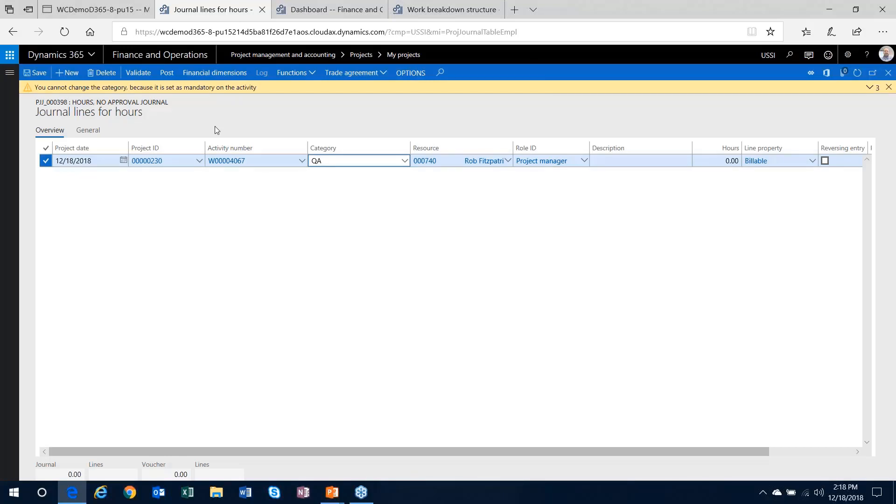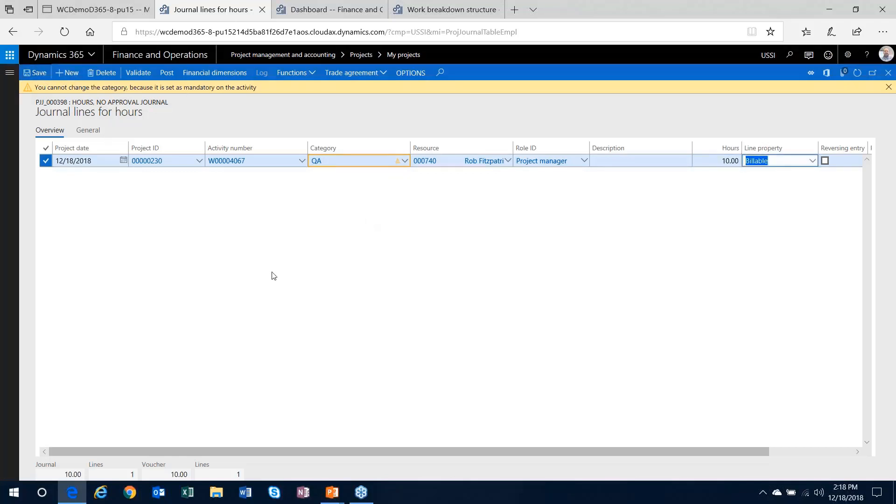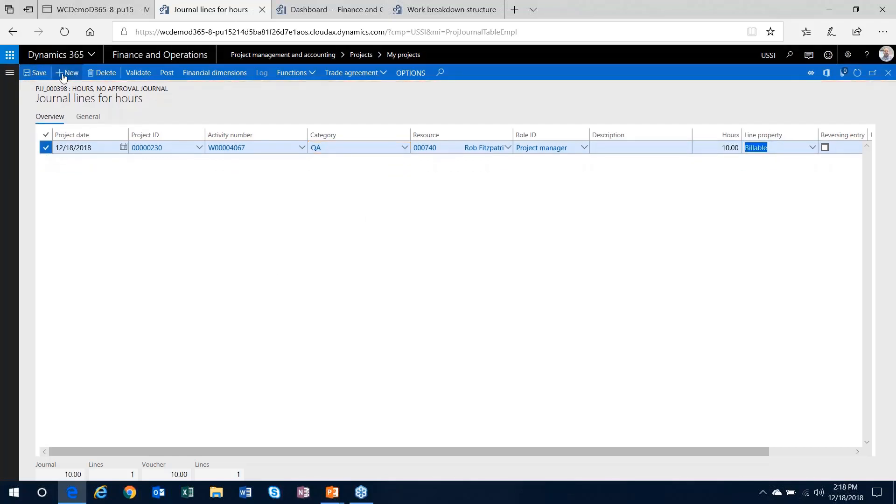So all that validation, all the settings and the checkboxes that we've checked, all will affect the data entry no matter how you do it. Whether I'm doing an hours journal, it's coming through a timesheet, expense report, purchase order - the same validation exists in all of the data entry areas for project transactions. At this point in time, once I know everything is good, it will save that transaction for me.